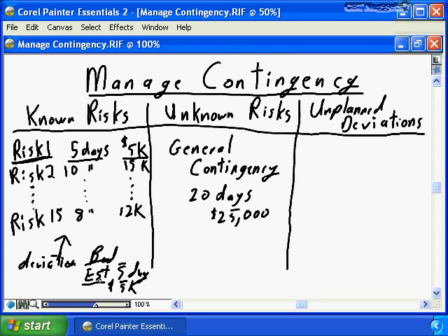If you have bad estimates, it's time to go back to the project plan. It's time to go back to the project sponsor and say, we've determined that we improperly estimated phase 1 for our project. We misestimated the number of business processes. We misestimated the amount of work to be done. Therefore, as a result of bad estimates, we need to allocate additional time, additional funds to the project.